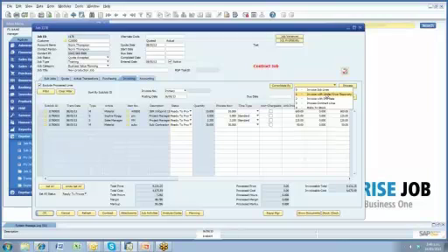So perhaps it's a $20,000 job. We're actually halfway through it and we want to invoice the $10,000, but we haven't perhaps applied some of the larger material costs onto here yet, but I can still invoice exactly how much I want to that month.